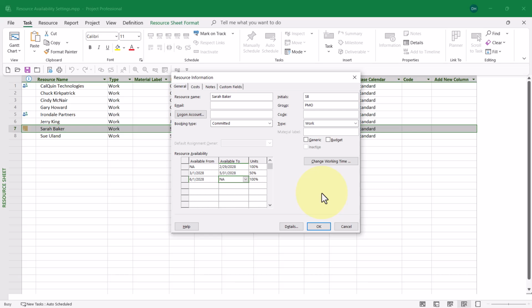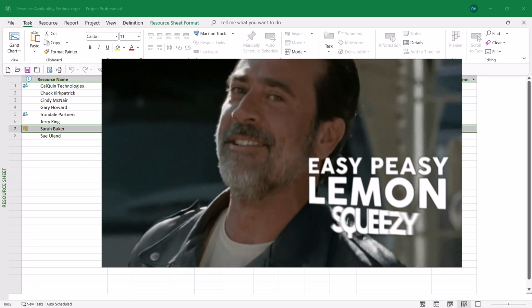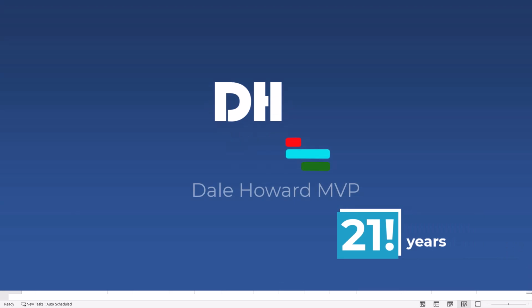So here's Sarah Baker's availability over time for this project. Up through February 29th of 2028, she will be available full-time. Beginning on March the 1st and running through May the 31st, she will drop to half-time availability. Then on June the 1st and thereafter, she will be available to work full-time. That's how you set changes to resource availability. To complete the process, simply click the OK button.